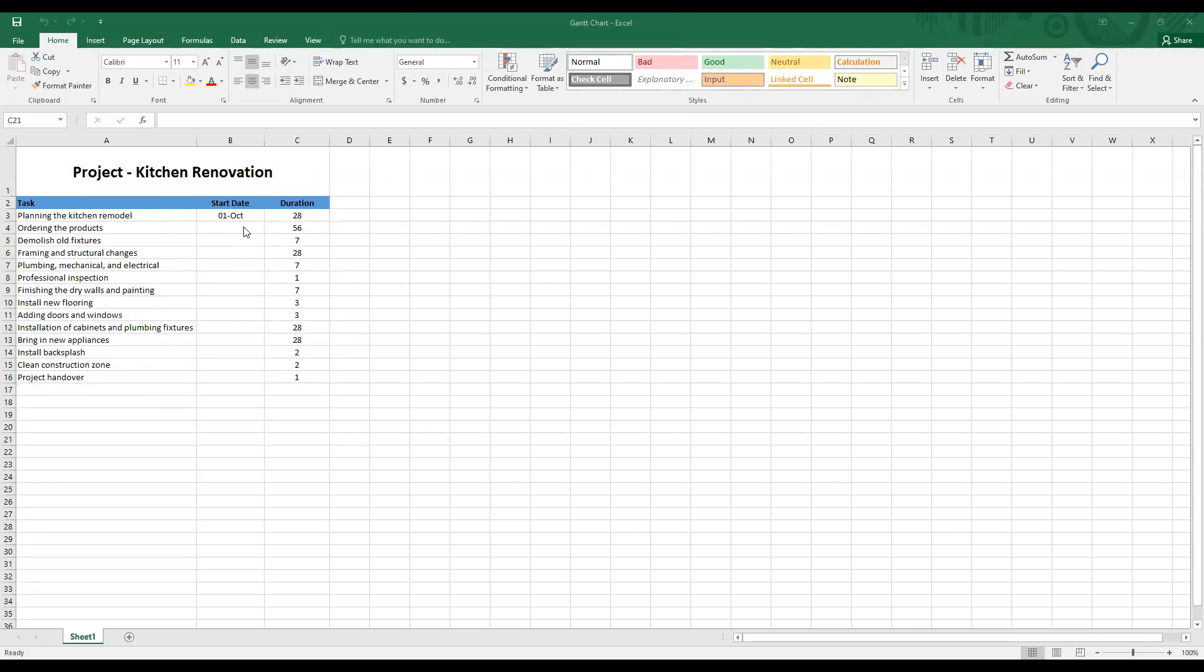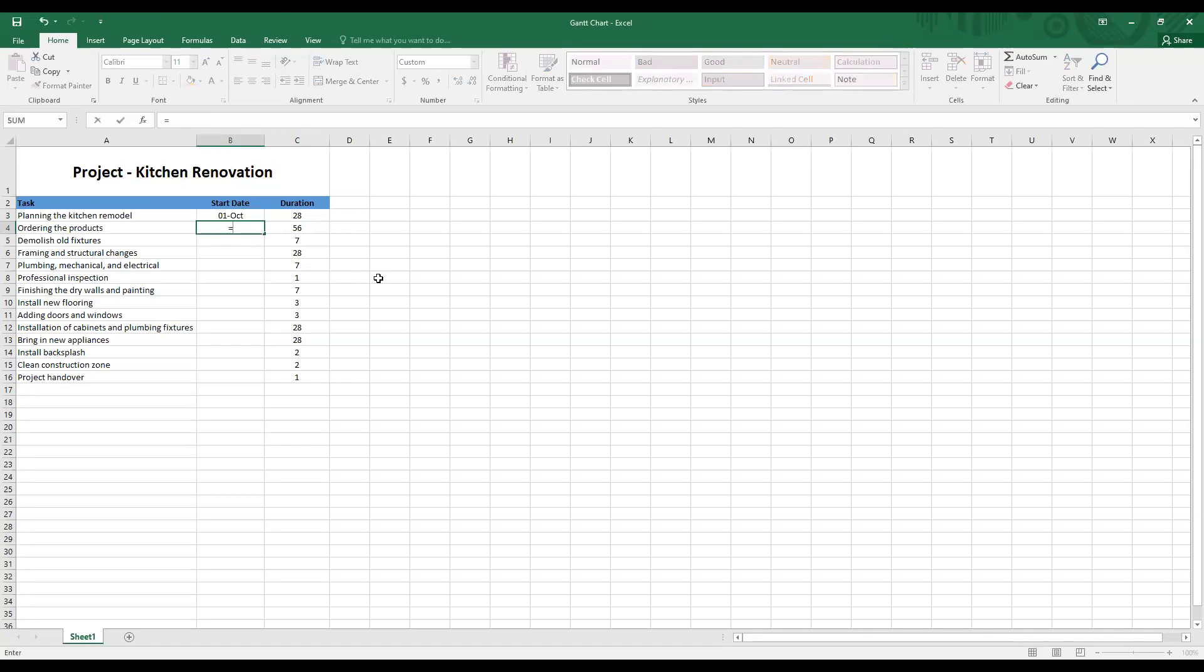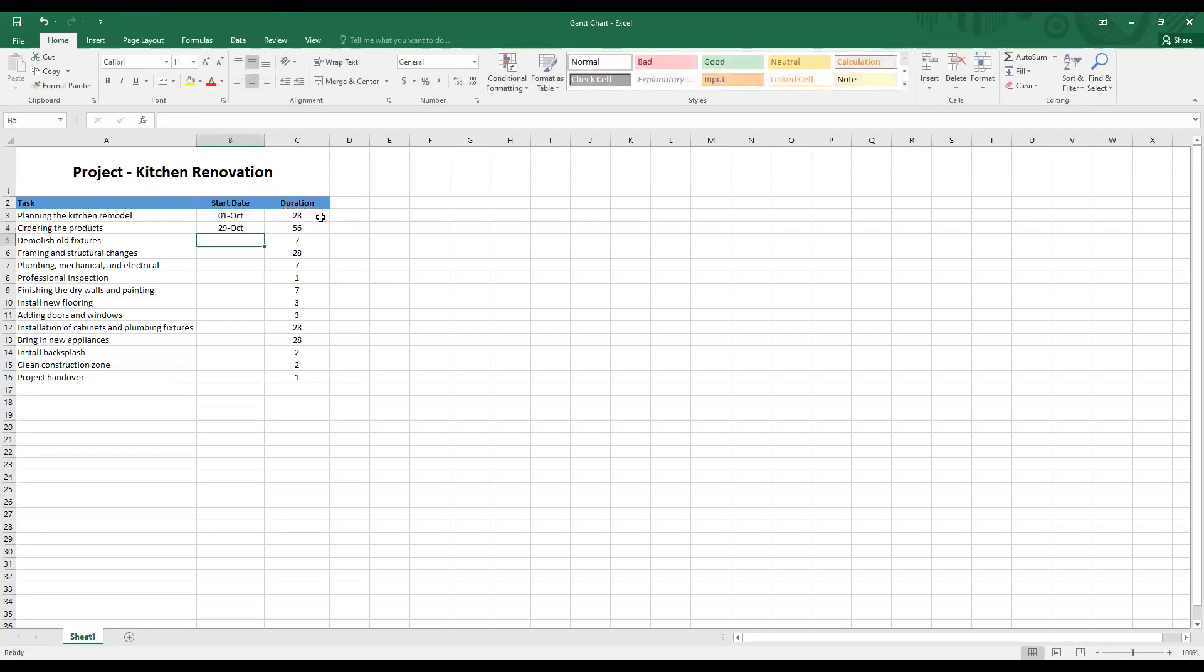Let me now work on the start date. So the first start date is selected as 1st October. And to generate the second start date, I'm going to create a simple formula. Equal sign, click on the first start date and add it to the duration of the first start date, plus this cell here and press enter. And there you have it. You have generated the second start date.